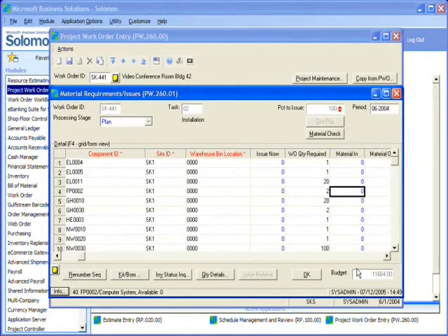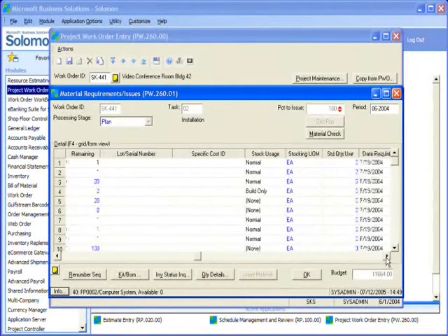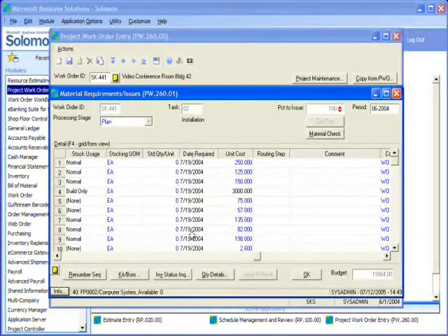That's cool. And what about the dates the materials are required? If we copied them in from the other PWO, won't those dates be wrong? These dates out here were already set to the 19th because they got scheduled to when the task is required to start. So we want those materials to be ready when we start the task. I see. One of the really cool things is that not only we're using this for estimating, but if we do land the job, then we'll have the same information just with a flick of the switch to make sure that purchasing knows exactly what we're up to and when we're going to be up to it.